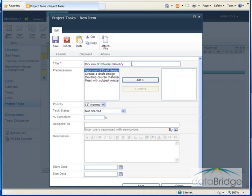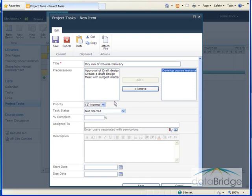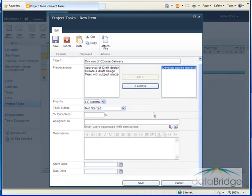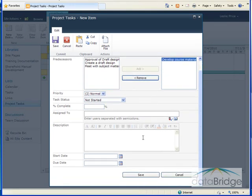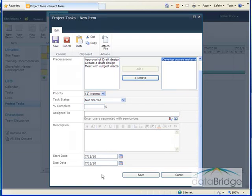So I've entered the title. The predecessor tasks will be to develop the course material. A normal priority, it's not started yet. The projected date for the dry run of the course is July 18th. So I'll enter that in both the start and due date. And then I'll choose save.